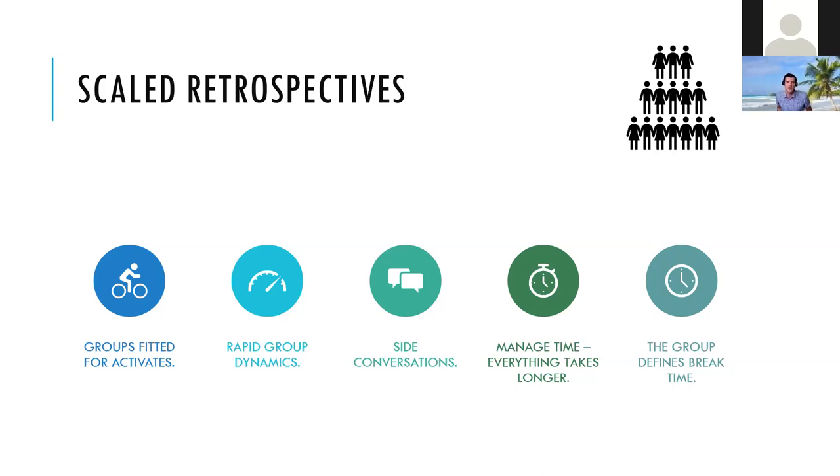And this is actually the role of either the Scrum Master, if it's regarding the process, or maybe the person accountable for delivery of this solution, to make sure that it sticks. You can agree that in the definition of done, when we accept that this process is completed, this needs to stay for at least such a long time. Changing the culture is very hard, and it requires a lot of attention. So it's not only one person looking after it, but even two, the person who did it and the Scrum Master. I would recommend doing that. You need to take care, while making the task, how it will stick with us for a while. How will it change? How will we verify that it's happening constantly?